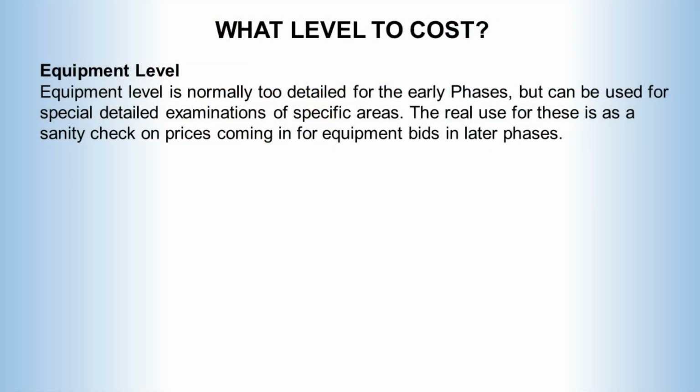Cost parametrics can be used at the equipment level, giving cost estimates for the system components by component. This suffers from some of the same problems as conventional bottom-up costing, in that you need to have a very detailed understanding of the system and components to do it. Probably more detail than you really needed at this stage. The problem is that such a large amount of design work is undertaken without any cost guide except the good judgment of the engineers. And like bottom-up costing, by the time you reach that point it is too late and too expensive to iterate the design.